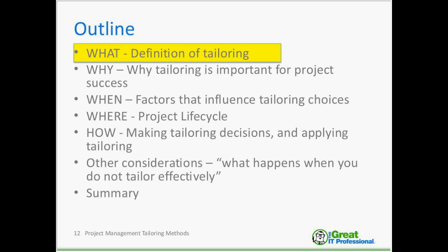So good practice does not mean that the knowledge, skills, and processes described should always be applied uniformly on all projects. And I'm reading this directly from the PMBOK. So what they say is that for any given project, the project manager, in collaboration with the project team, is always responsible for determining which processes are appropriate and the appropriate degree of rigor for each process. Now, in my own words, that is because the project manager fully understands the interrelated elements of the project management processes and can make tailoring decisions that will not inadvertently impact the project.